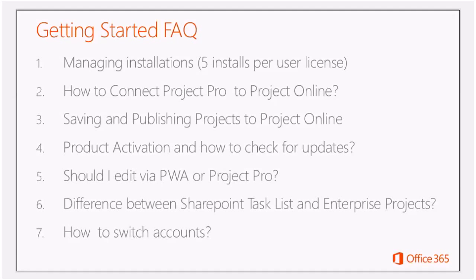And one of the other points I wanted to raise, I meant to raise it when I was doing the demonstration. We've had a few customers calling in where they are using a SharePoint task list and they've actually turned on versioning in that task list. Yeah. And one of the things that you'll find is that when we sync between Project Pro and the task list, even though you may not have changed anything, it's actually doing some chat back and forth and it's touching the list, and it actually does create a new version on the items that are in the task list.